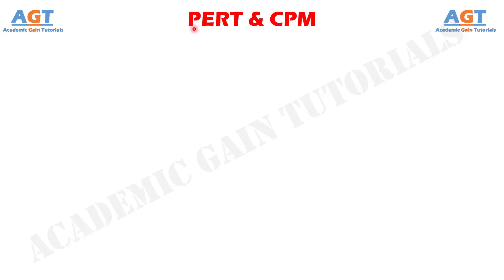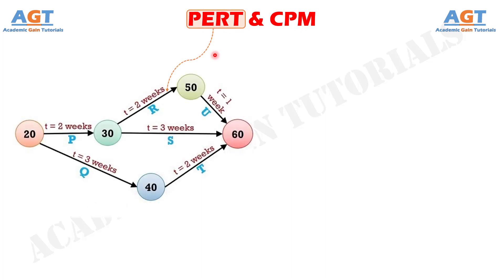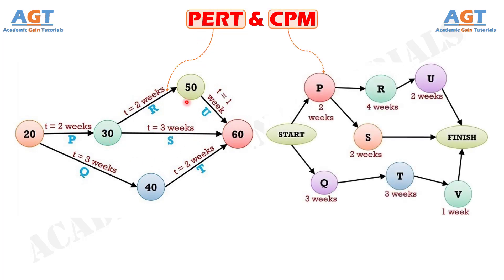Program or Project Management and Review Technique, PERT, is appropriate for the projects where the time needed to complete different activities are not known. On the other hand, the Critical Path Method or CPM is appropriate for the projects which are recurring in nature.